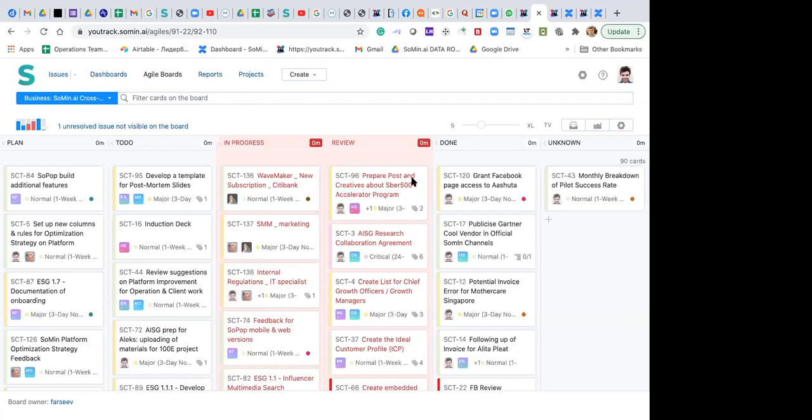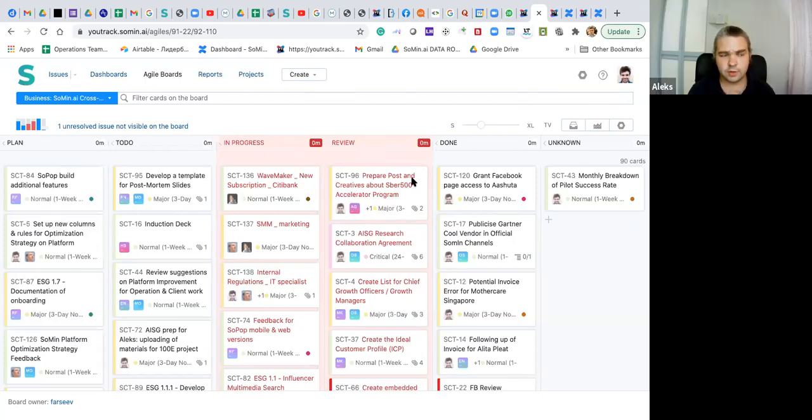As long as it's something that is agreed and is in the metrics on the Youtrack card, we should always update it. Correct. So you created a deadline date. The person looks, the deadline is too early, cannot fulfill. Then the person is in charge to make sure that you know that it's too early, that either of you have changed it. Because if either of you didn't change it, then the responsibility is on the person who's supposed to fulfill the task. If it didn't change, it means the person agreed to the deadline.